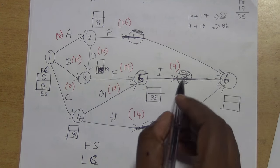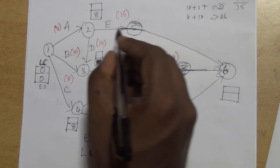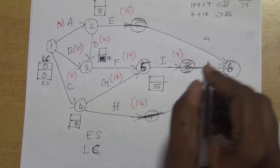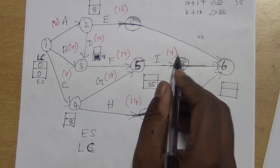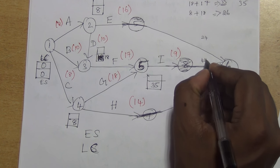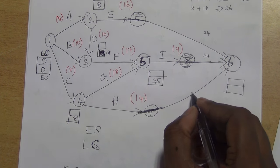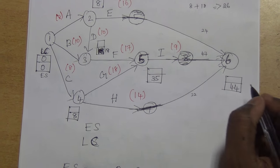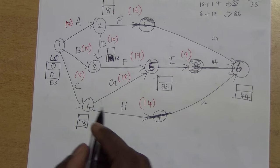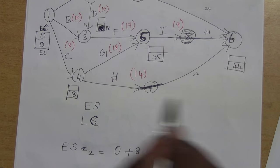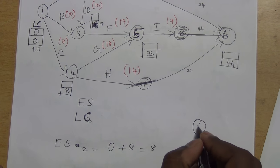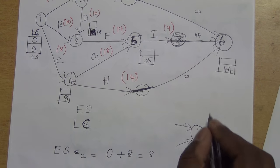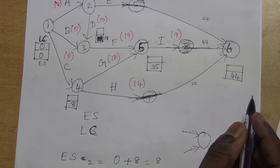So when we have multiple incoming arrows, we take the maximum of those values as the earliest start time for that node. For latest completion time we start from the last node. For the last node it is 44, there is no change because there is no outgoing arrow from this node. Then we go for node 5 — it has one outgoing arrow to node 6, so 44 minus 9 equals 35. We write 35 here.